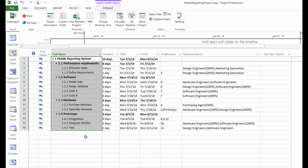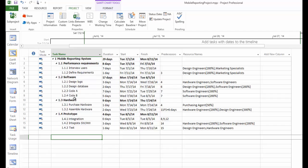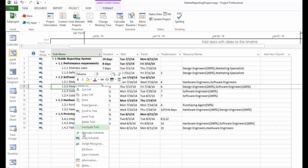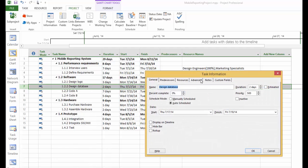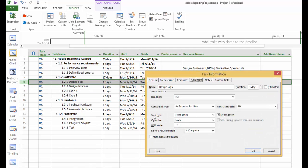This will usually change all the tasks you selected back to fix unit. But in some rare cases, the program may not change every single task. So to be safe, you can go to every single task and check information, advanced, and see the task type shows fixed unit and effort driven checked.